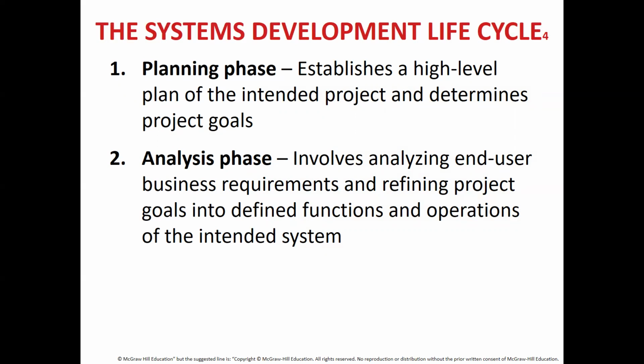What you want to do is list down why you want to get a project done, what the project goals are, and why it is necessary to get the project done there and then. Once you have listed it in a document and done a presentation, if the management approves, then you go next to the analysis phase. The analysis phase involves analyzing end user business requirements and refining project goals into defined functions and operations of the intended system.